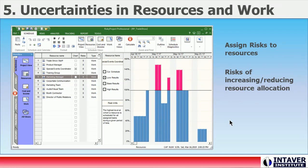Step 5: Uncertainties in resource and work. Resource allocation is a major driver of risk in many project schedules, but is often overlooked as a source of risk when creating a model for Monte Carlo risk analysis. Applying risk to resources provides an efficient method to broadcast the impact of risk across your schedule and effectively measure the impact of risk on resources and work in your project.